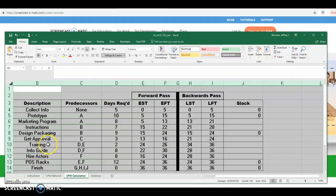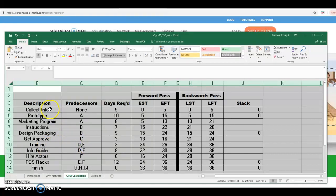On the forward pass, this is where we need to be a little more careful. Since there are two predecessors for the training activity — both D and E — we need to look at the activity that finishes the latest, because both must be done before training can start. Looking at D and E: instructions and design packaging — the latest finish time is day 24. So training can start on day 24; it's a two-day activity and finishes on day 26.